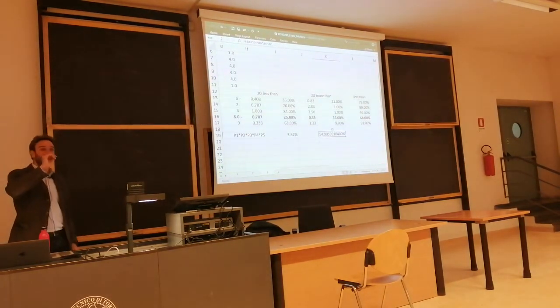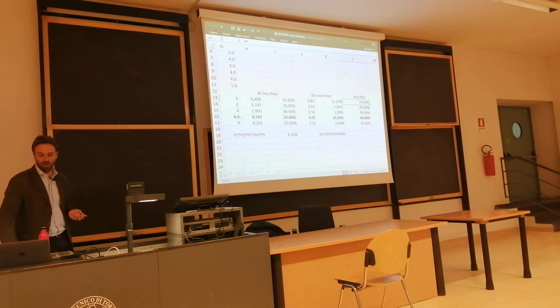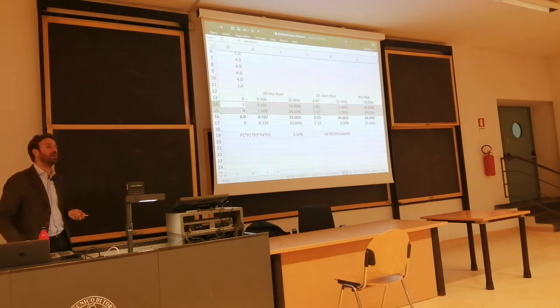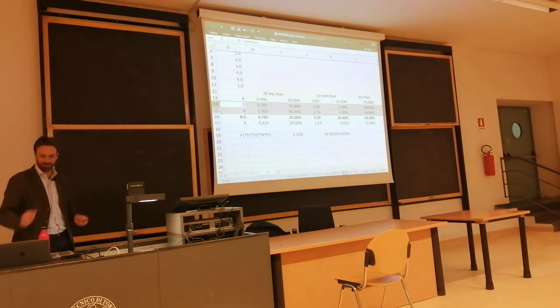As far as you don't have an Excel file in the written exam, to me it was just important to recognize that the paths that would impact are path number 4, path 5, and path number 1. And you may want to discard path 2 and 3, just to make calculations much quicker.